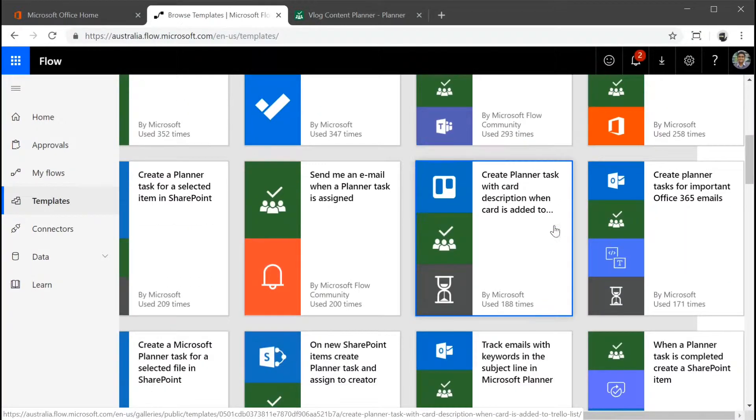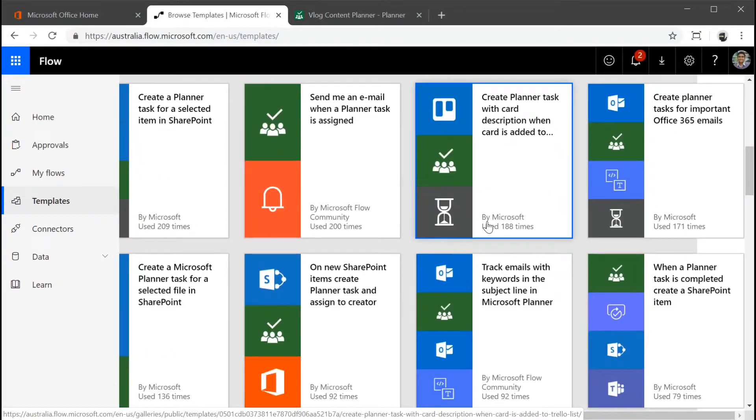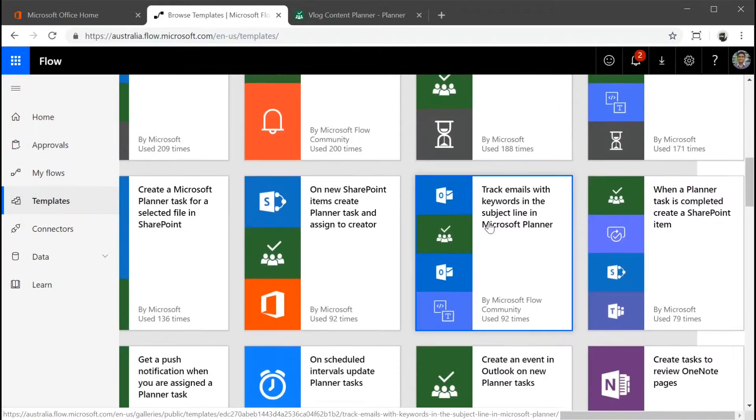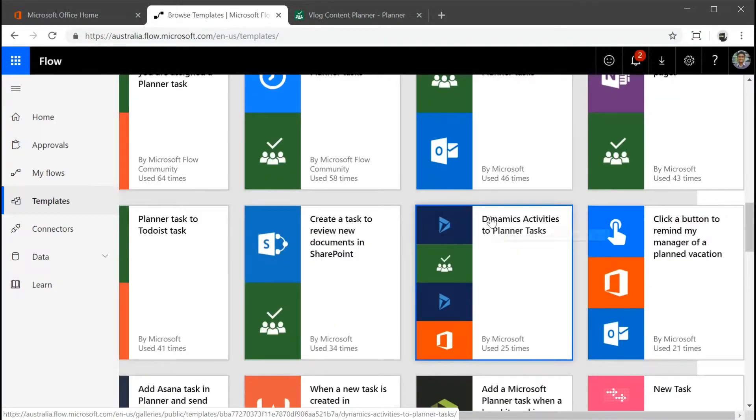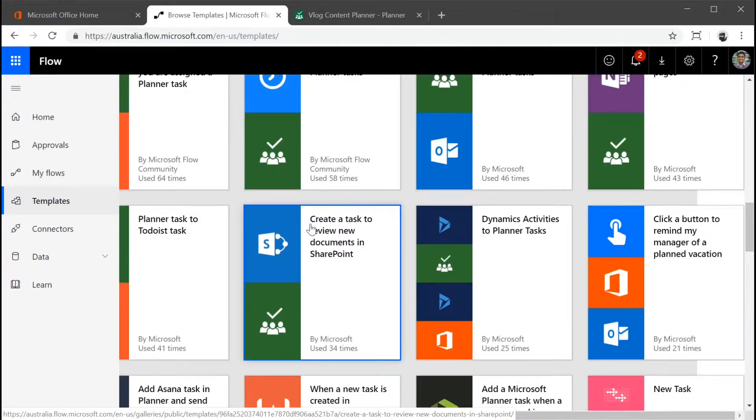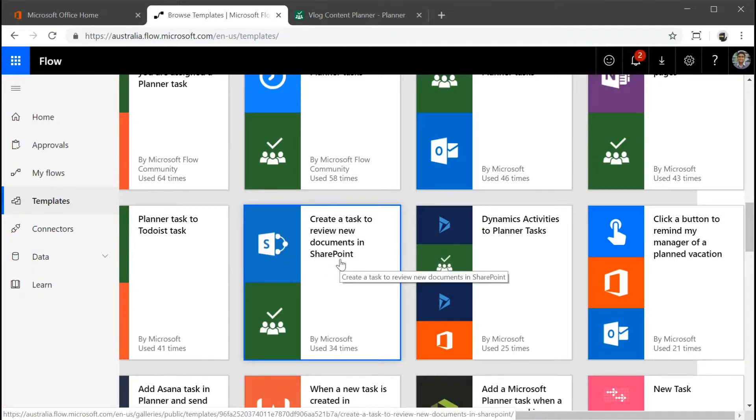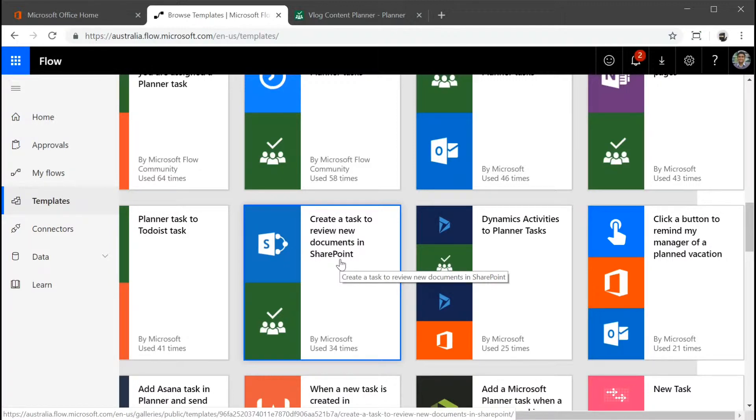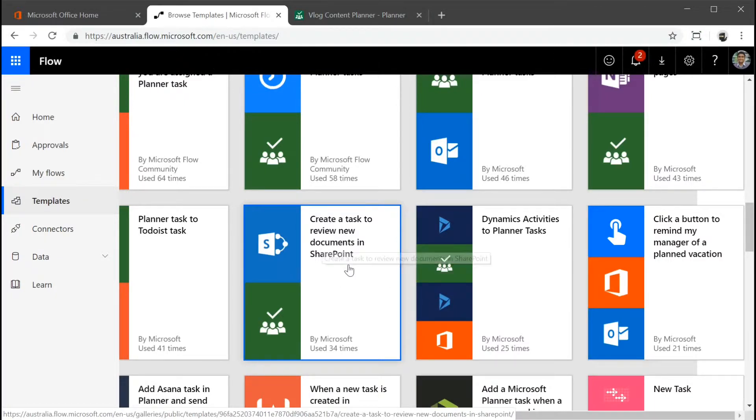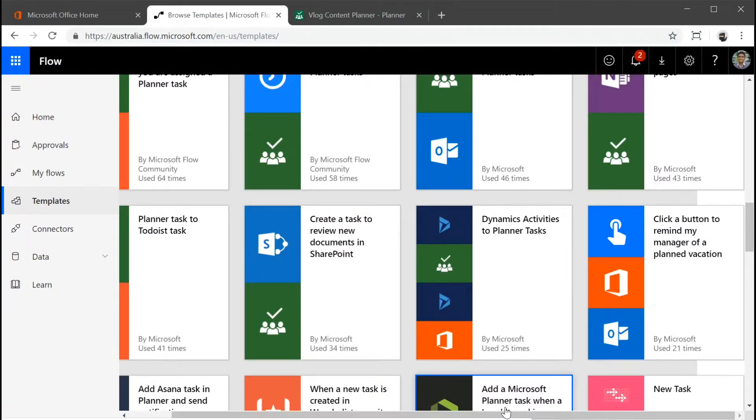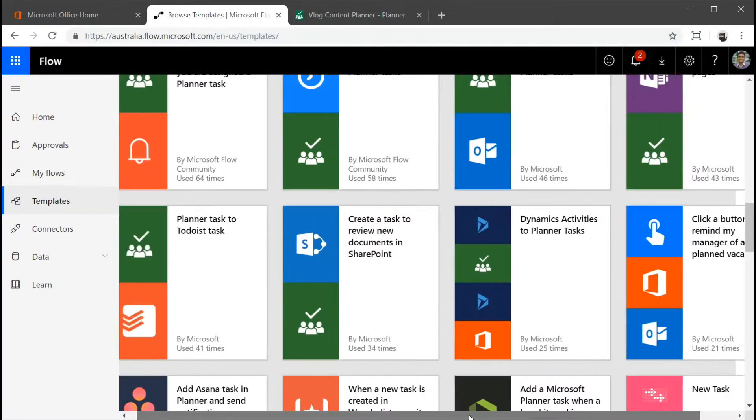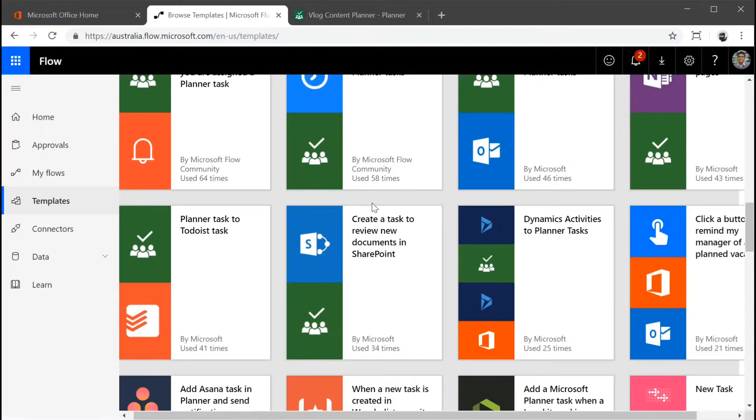So there's also a few others, for example, see how you can actually create a task to review new documents in SharePoint. Say for example, in SharePoint document library, you're working on a bid and people are actually uploading files into ready for submission or ready for review folder. Once they reach that folder, you can actually create a task within Planner and assign it to the consent people as well. So this supports your bid management, or even for that matter, for project management or any other activity that revolves around approving documents.